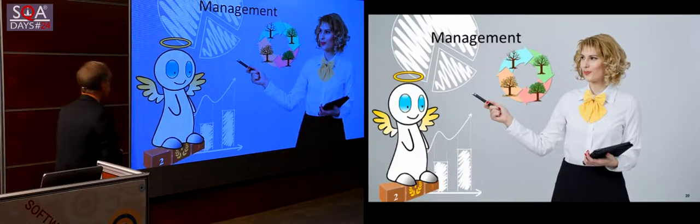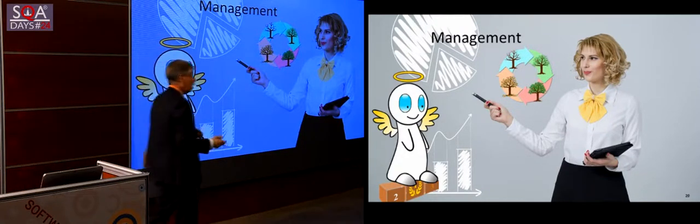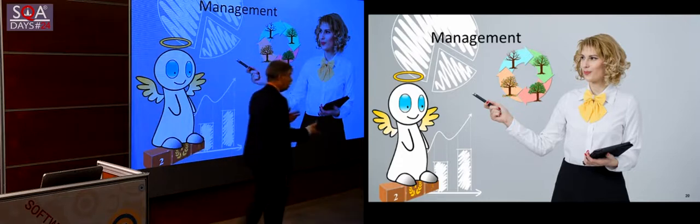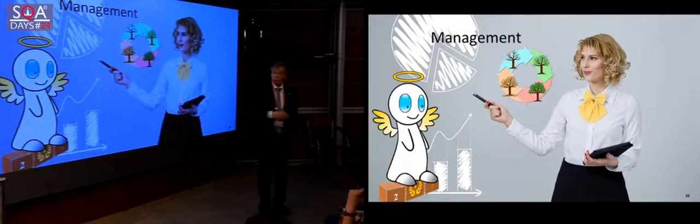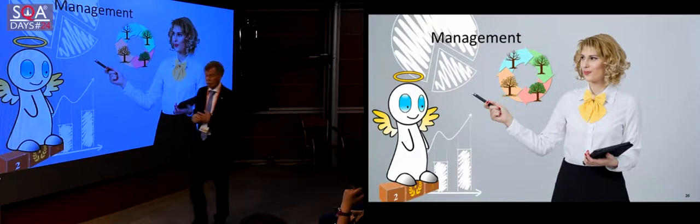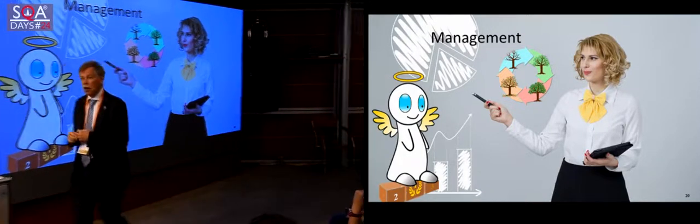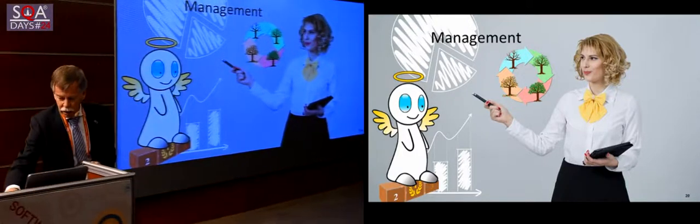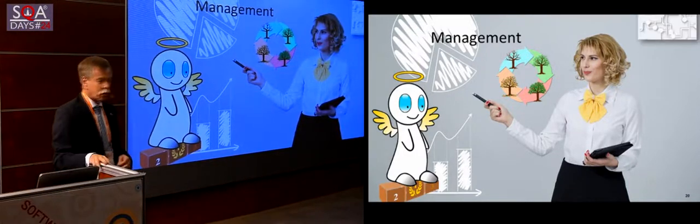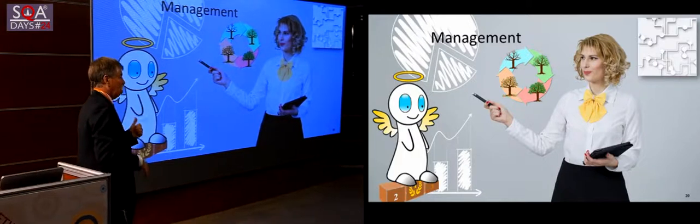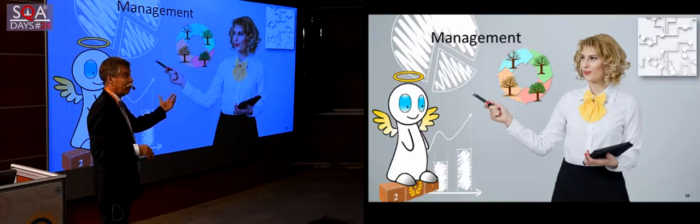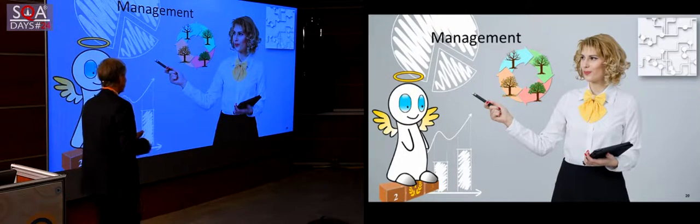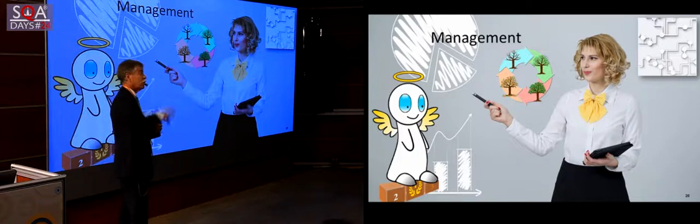The life cycle of requirements: there are changes in requirements, they are changed, deleted, updated and whatever, and you have to keep track of it, including version management. And the last and certainly not least thing for requirements management is traceability. For every requirement, you have to know where it came from, in what sources did we find them, with what techniques did we uncover them, and where is it used.